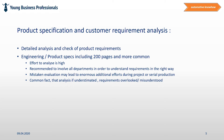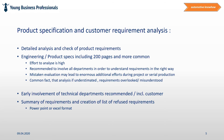It is recommended to get in touch during that phase with the corresponding technical contact of the customer so that engineering of supplier and engineering of customer may align themselves on the requirements and specification. It makes sense to summarize that analysis in a PowerPoint presentation or Excel sheet in order to use this information later during the RFQ phase. It also makes sense to highlight requirements that can't be fulfilled or that have to be blocked, as these should be added to the quote later on.